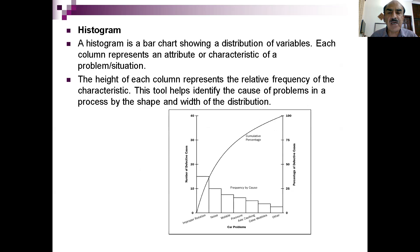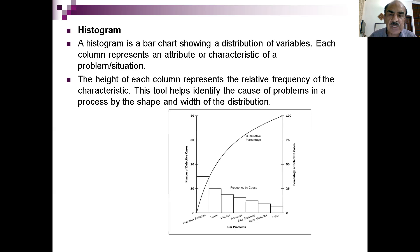Histograms are bar charts showing the distribution of various variables. Each column represents an attribute or characteristic of a problem situation, and the height of each column represents relative frequency. For example, categories might include improper rotation, noise, wobble, pressure, axle cocking, case wobbles, and others. Based on this, you can see that the highest frequency comes from improper rotation in the system. Based on that, we can decide what is the biggest source of problem and fix it.